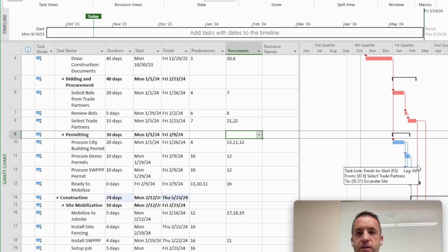Eventually, you guys will go on in your careers and you'll find that some of you will use Primavera, and there's a report on it that looks for open ends, and you should have exactly one open end on each end of it. Because your first activity won't have a predecessor and your final activity won't have a successor, but every single activity in the middle should have a predecessor and successor.